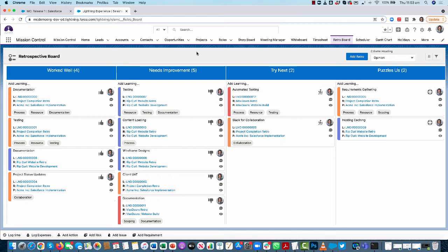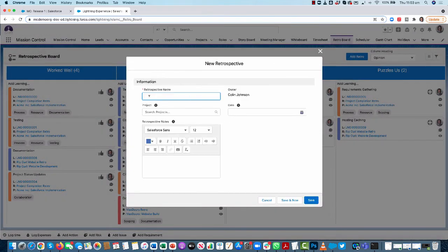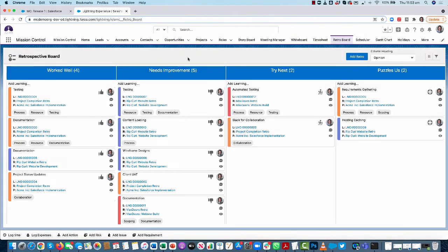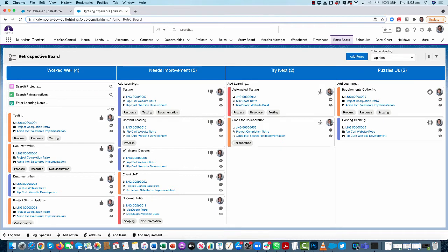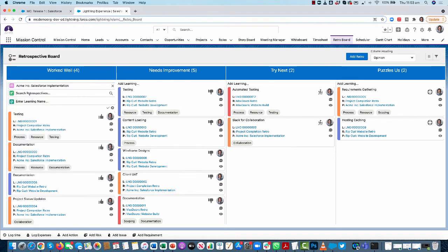First of all, from scratch, what we would need to do is create a retro. So if I click on that, that allows me to go through, create a retrospective, relate it to a project, set the date, and so on. Once I've done that, I'm able to start adding learnings. So I can click in here. I can say, okay, well, I'm doing a learning. So I'm doing a retrospective on this project.